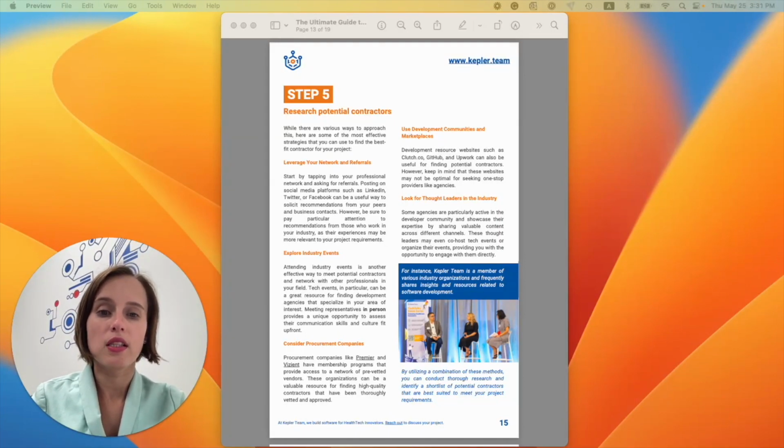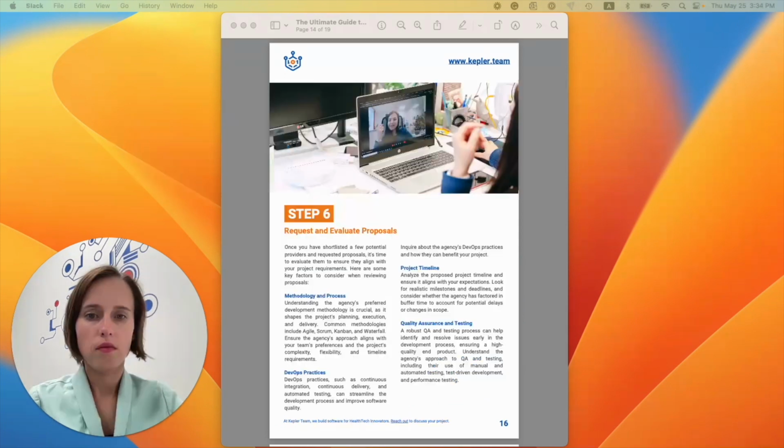Certainly check out listings such as Clutch. Clutch is as good for rating software development agencies as OpenTable is at rating restaurants. We recommend getting at least 2-3 proposals. Most probably, they will vary slightly or significantly in timeline, budget, and included scope. These are important, but there might be other aspects to base your decision upon.